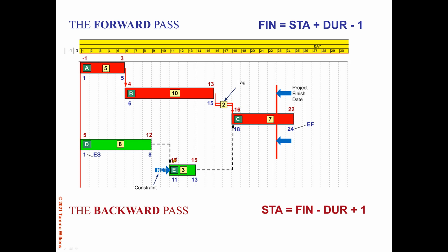So again, E needs to finish by day 16, the day before C, its successor, wants to start. And so in that case, it has to start no later than day 13. And for D, it has to finish no later than day 12 and start by day 5.